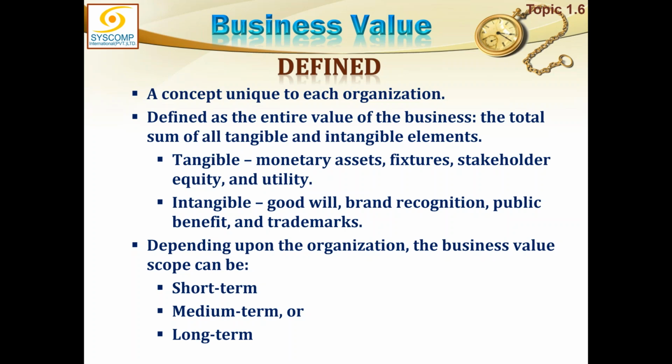So what if it is a 25-year target? Then you must have your medium-term targets, like after every 5 years, how much value you should achieve. So you will break down from 6 to 24 into that many midterm targets, and you can assign those targets to each 5 years.